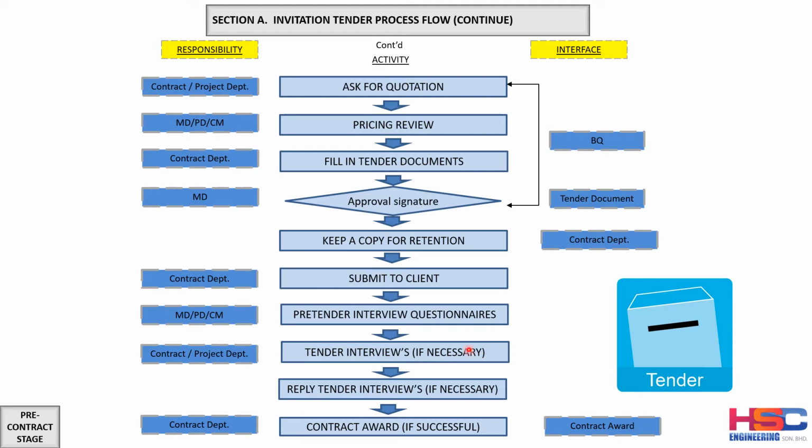And if not, also after the tender interview meeting, they will have to reply to whatever inquiries are given by the client or the consultant team of the client. And after this, we expect at this stage there will be more than one repeating cycle, where the client will call the contractor for many rounds of discussion to review the tender and the submission of the contractors.